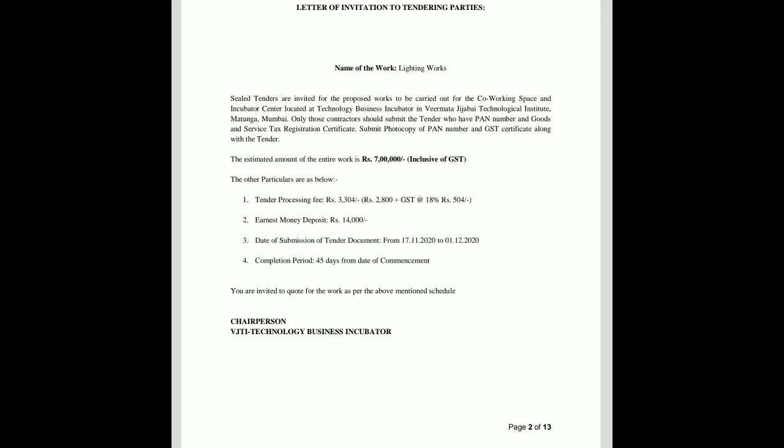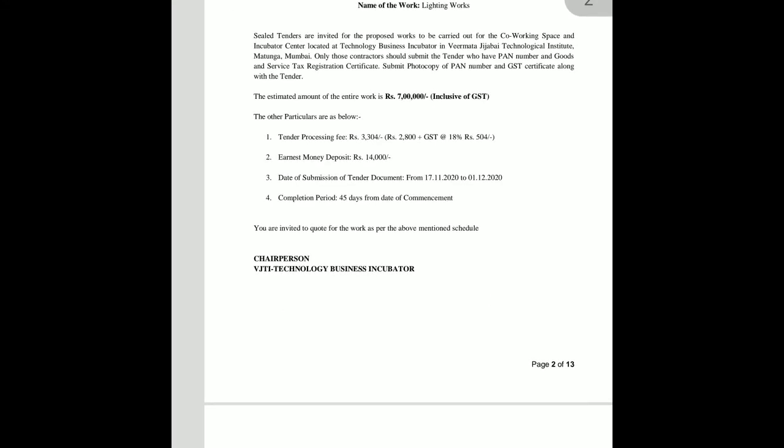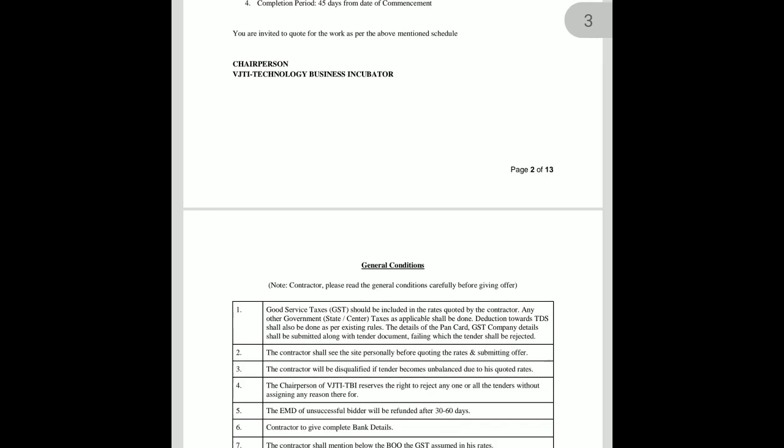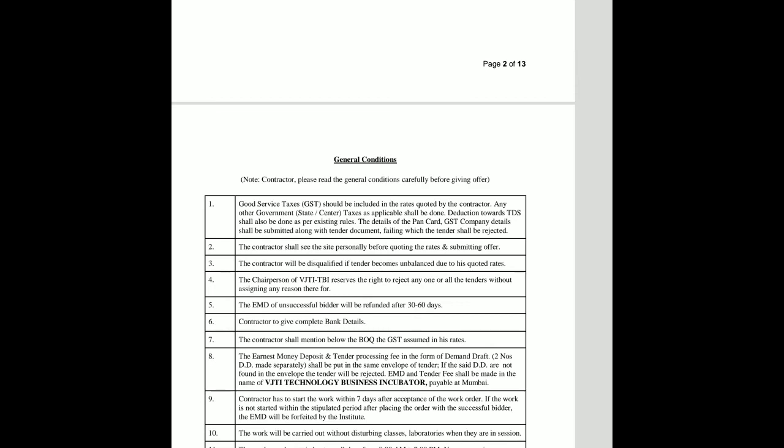Only those contractors should submit the tender who have a PAN number and goods and service tax registration certificate. Submit the photocopy of the PAN number and GST certificate along with the tender. The last item in this notice is the chairperson of the VJTI Technology Business Incubator.